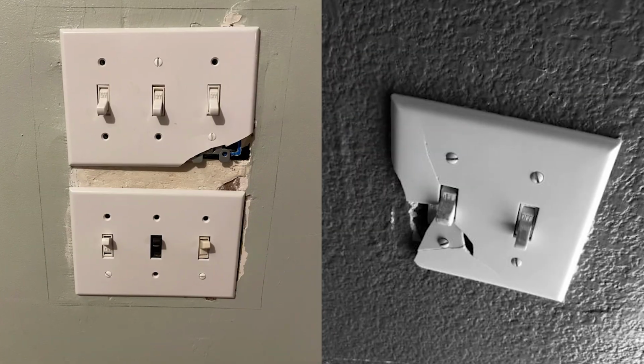So the way this blue tape walkthrough works is you basically walk through your new home with blue tape in hand. You may see that a switch plate is cracked or crooked, or maybe the light fixture is damaged or not operable. You are going to place a piece of tape on that item. The builder's going to write it down, your realtor's going to write it down, and you should write it down too. The builder is going to use the blue tape and the list and get those items fixed before your final walkthrough and closing.